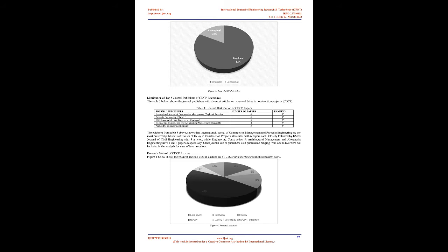The paper highlighted 10 delay factors to comprise changes in design, delay in paying contractors, poor planning and scheduling, bad supervision and site management, inadequate or inappropriate design, contractors' inexperience and competence, shortage of finances, sponsor or owner's financial difficulties, shortage of resources, poor labor productivity and lack of adequate skills.